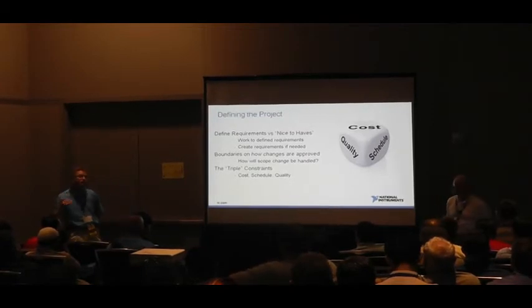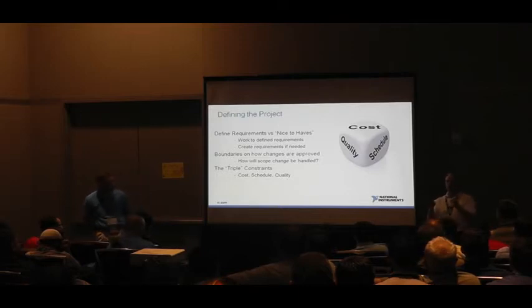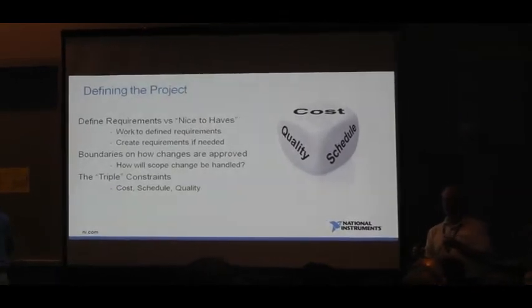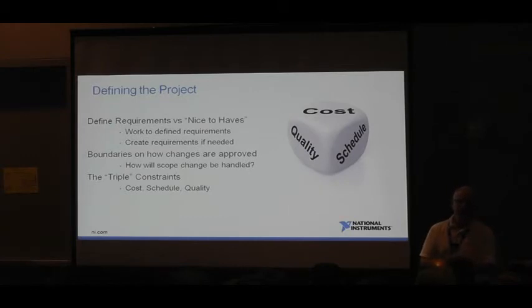And if it's really worth having, take it to the customer. And maybe they approve doing something like that. So for a fixed price contract, adherence to the statement of work is key, and keeping within those boundaries. As you start creeping outside that boundary, then you run the risk of, like I said, spending too much time, your costs go up, and you're doing work that's not authorized. So it's okay to share with your team as requests come in to add new features, push back. And by that I mean politely say, yes, we can do that, I'd like to do that, but I need authorization to do that extra work.